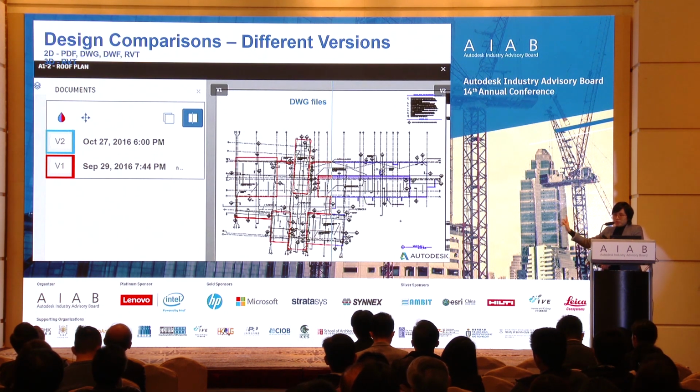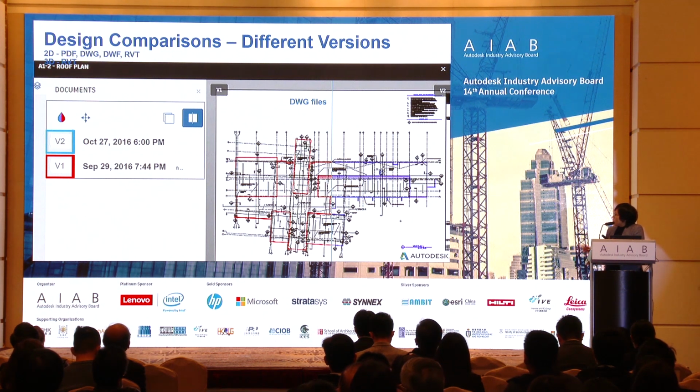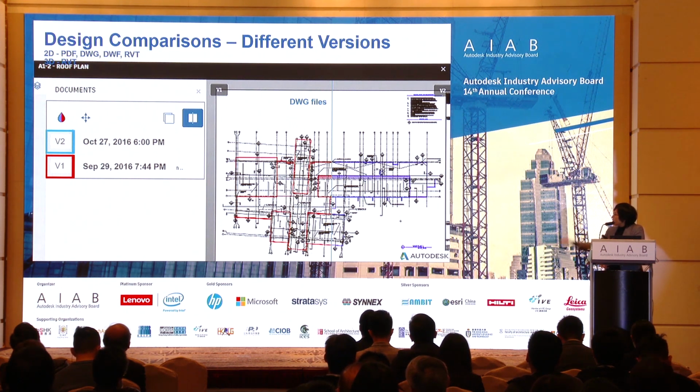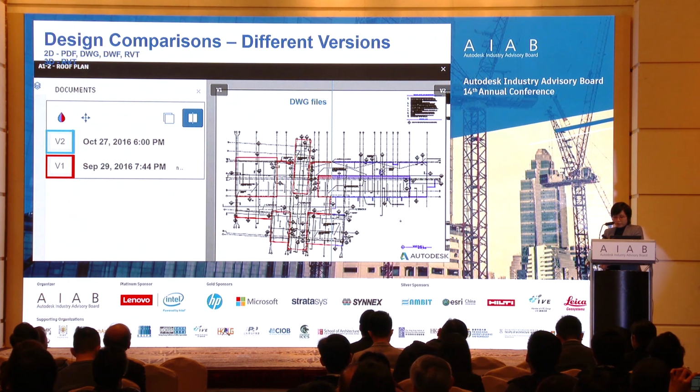And for this one, this is very important to you if you are the BIM manager or owner. You have different drawings in your BIM 360, right? And then you want to compare different versions or compare different floors of your building. We have this function for you. So you'll find that there are red and blue colors in different sizes. Actually, they are the same drawings, but two different versions. So you have this line in the middle, and then just drag to right or left, and then you will find the differences.